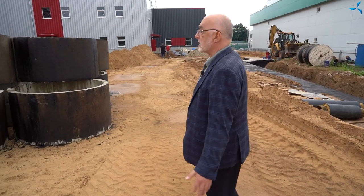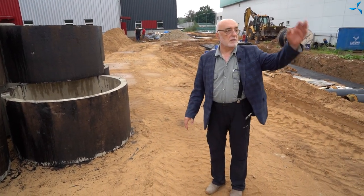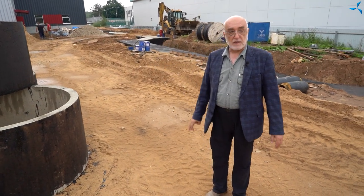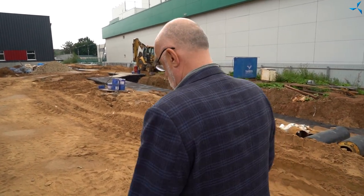On this spot, a pit of big depth will be placed, 6.5 or 7 meters, to do the piercing. Thus, utility sewage has been connected. Heating main as well. We can say that it is at its final stage. Backfill is to be done, actually. There is some more work left there for hydro-isolation of trays, but we can consider that it's small work. Still, let's not state that work there has been completed. No, it's in the process.